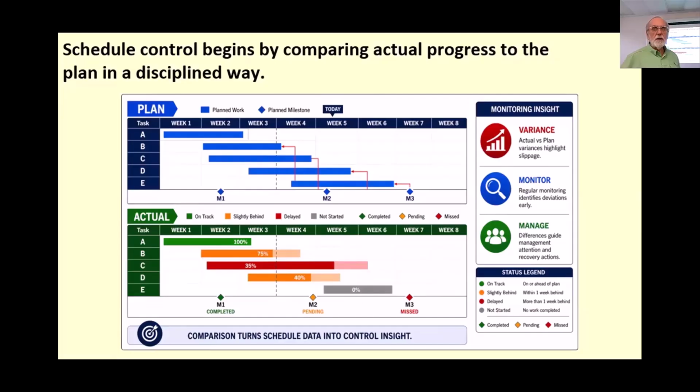You can kind of get caught in a false activity trap, is what I like to think of it as. Everybody's really busy and it looks like things are going like they planned, but without really good metrics and really good schedule analysis of the real tracking of the real work, you might not get a feel for if things are starting to lag. Maybe people are completing stuff a day late, and then the next week it's a day and a half late, and the next week, so you can start seeing that as you do this.